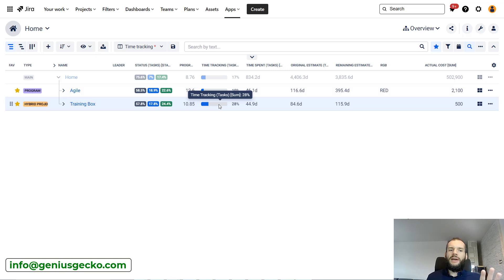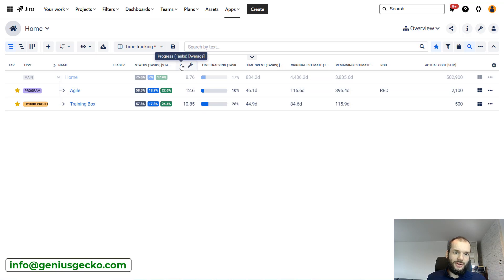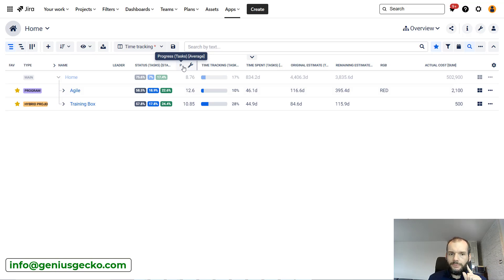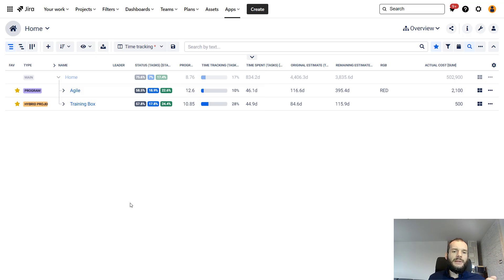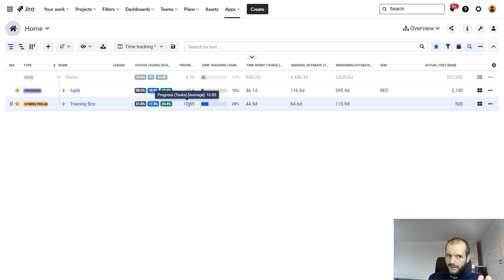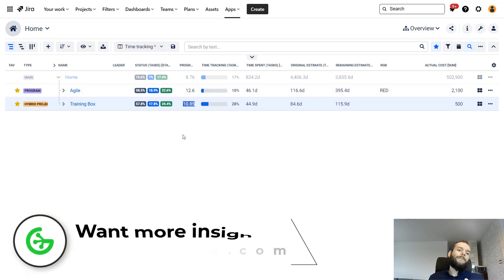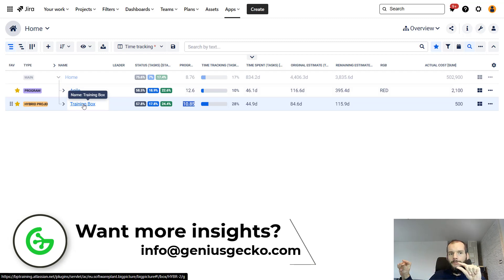We can also display the progress custom field from tasks at the box level, but there is a slight problem: the aggregation averages values from all tasks in the box, which may not reflect true progress. If you really want to use custom fields for progress at the box level, it's better to go into the box and look at the progress value on the topmost element, which will be more precise. That's it for this video — I hope it was useful. If you have any questions, leave them in the comments and see you in the next video.